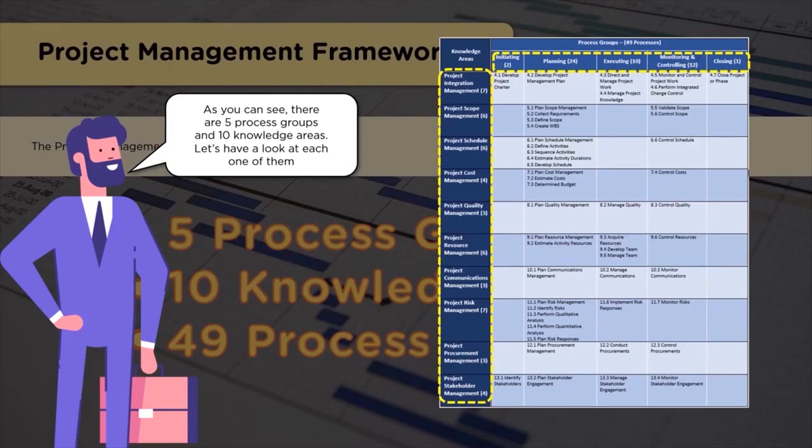Once it is implemented, again validation happens. Once control checks if everything is okay, then it moves to the closure. Now activities in closure, a project or a phase involves just activities of closure. The products or services or results which are created from the project do not go to closure until those are validated, checked, confirmed and signed off. Only then it goes to closing project or phase.